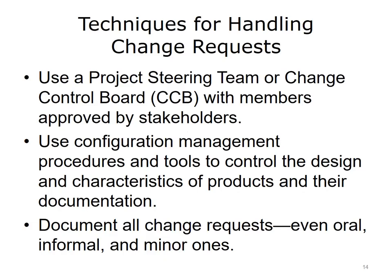Your process may include a project steering team or change control board to evaluate changes with input from various stakeholders. Configuration management procedures and tools can help you keep track of versions of requirements, designs, code, tests, and so on. Carefully document all change requests, however minor they may seem. This system will help you remember details or suggestions presented in a casual conversation that may be useful later on.